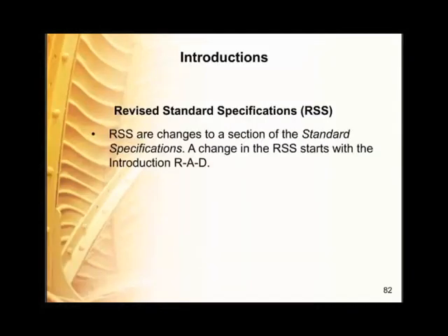The 2010 standard specifications contain Caltrans standards. Changes to the standard specifications are in our revised standard specifications, which are included in every project at the end of the special provisions. The revised standard specifications, commonly referred to as the RSSs, replace the old amended to reads that we used to have in the 2006 standard specifications. The revised standard specifications are typically updated quarterly, but more frequent updates are made if necessary.